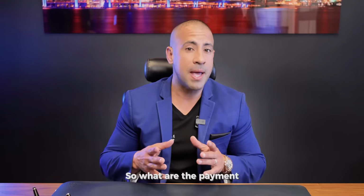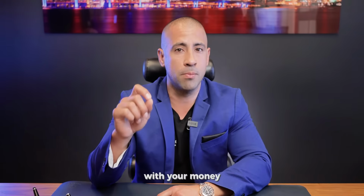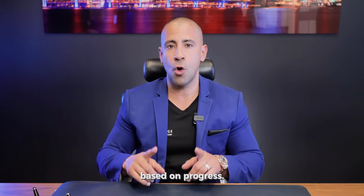Question number 7, what is the payment schedule? So what are the payment terms for the project? You never want to pay too much upfront because people could literally run away with your money or use your money for other projects. Payments should be fair for you and the contractor based on progress.